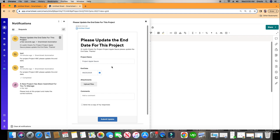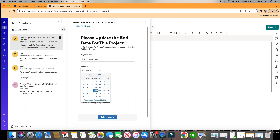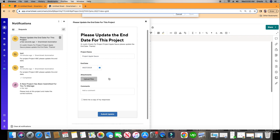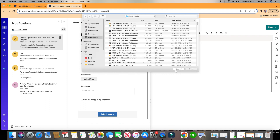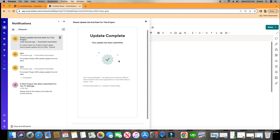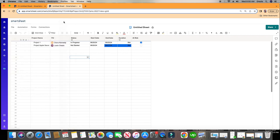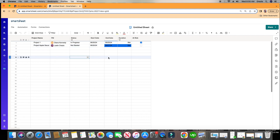Right here, as the PM, I can make my changes. It's asking me to update the end date — here's the end date field. I'm going to change it to the 27th. If I need to attach anything, I can attach it. I can leave any comments. And then I can click Submit Update. And there it is — update complete. You can see right there it automatically made that update.